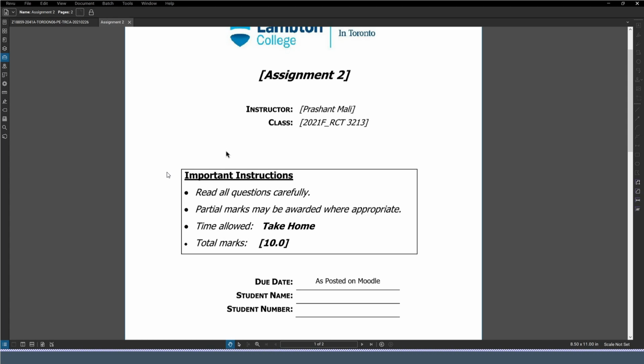I would really not like to see something which is a document update date. That I can go in the properties of Excel and figure out as well. It has to be every row. Every row has to have its own update date, right? So let's say it's a brick, and there are 5 suppliers: Brampton Brick, Lowe's, Home Depot, Rona, and XYZ.